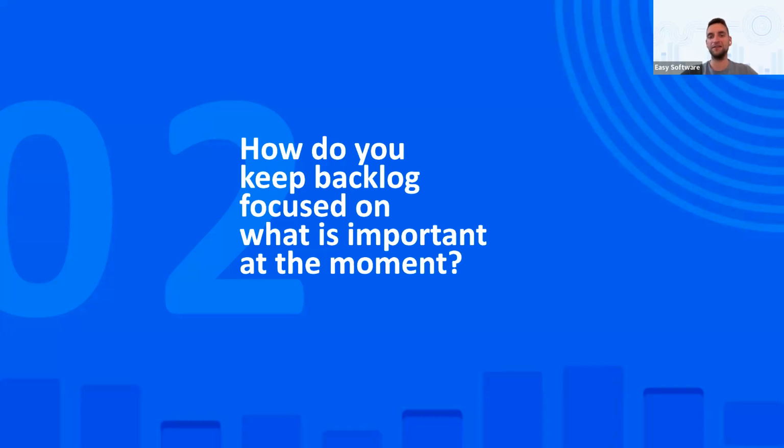Do you have any recommendation from your experience on what's the maximum number of backlog items that should reside within the backlog? Yeah, from my experience, and I read it somewhere, your brain is able to focus only on, let's say, 30 items on the board, to know in detail what is in them and be able to compare them together and prioritize them.